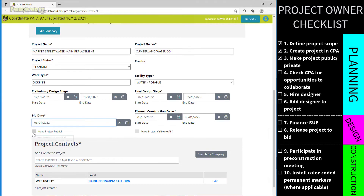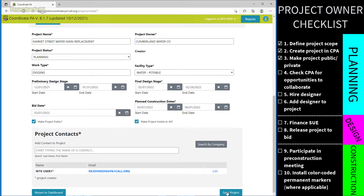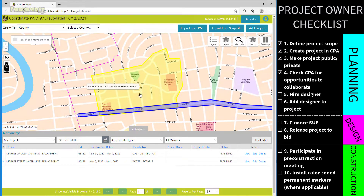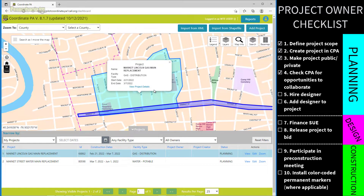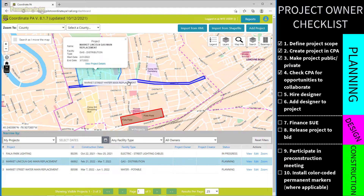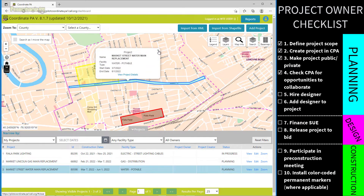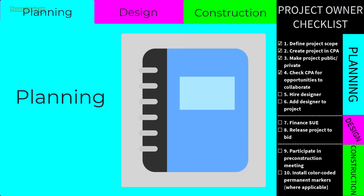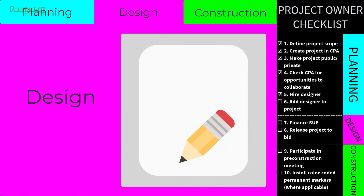The project owner also has the option to make the project public or private. If private, only the owner can see it; if public, anybody in CPA can view it. Making the project public allows others planning nearby work to collaborate. For example, if the gas company is working on the same street three months later, you can coordinate to open and repair the road at the same times — saving significant amounts of both time and money.